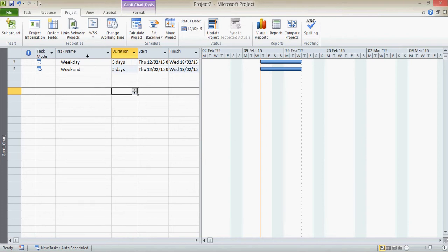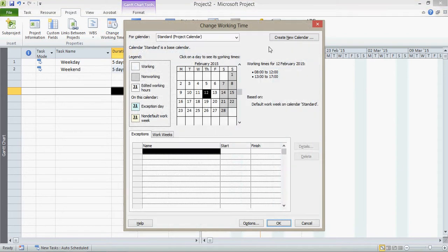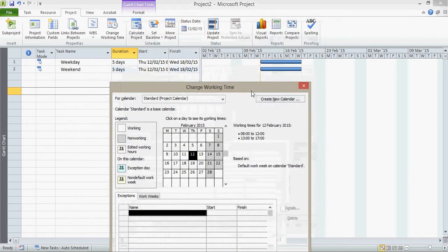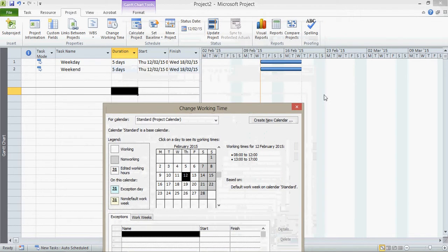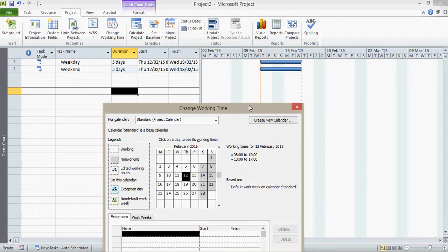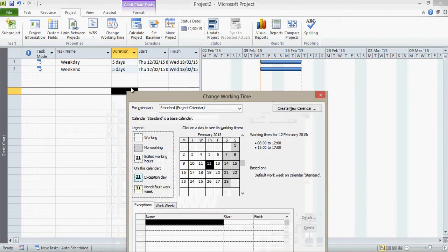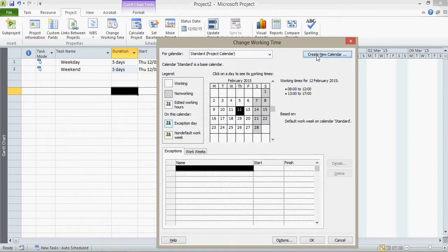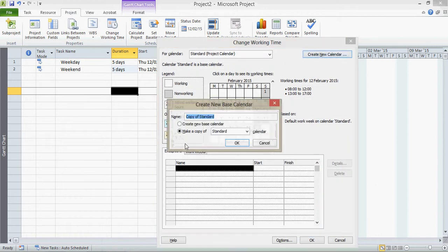However, I'm now going to change the working time and create a new calendar, because you can see my standard calendar allows normal working during the week but not at the weekend. And this has an impact on my tasks which can't work over the weekend. Now clearly, my weekend task I want to take place including over the weekend. So I'm going to create a new calendar. I'm going to call it weekend.